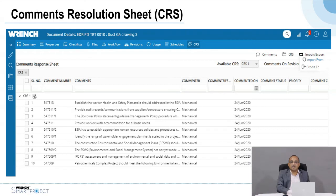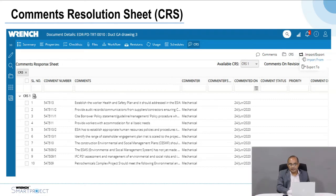If there are many comments inside a PDF drawing, the system can extract them and create a comment resolution sheet capturing all comments in the drawing. The contractor can choose which comments can be executed and which cannot, and the owner makes the final decision. The contractor must then make changes as agreed per the comment resolution sheet. You can also track how many comments are outstanding and monitor their status.